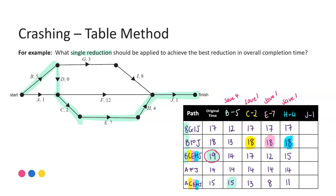Our final option, J — J appears in every single pathway because it's the last activity through which everything must flow to get to the finish. So each of these pathways will have a reduction of 1 from their original time. Our longest critical path hasn't changed but we have been able to save 1 unit. So overall, the best option is to reduce B — saving 4 units from the overall completion time, bringing it from 19 down to 15.